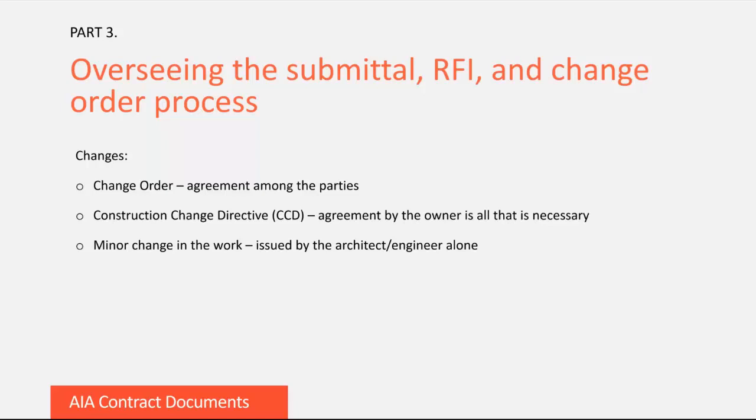When those amounts are settled and you've performed a portion of that work, you can request payment for the completed work. And a minor change in the work can be issued by the architect or engineer alone. Minor changes do not carry a cost or time increase or decrease.